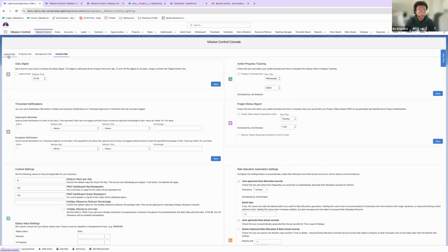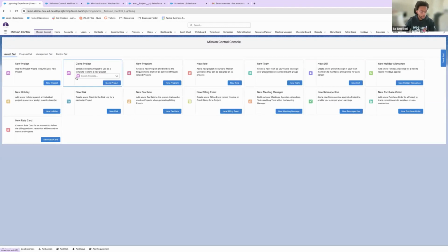All right. So let's go ahead and go into our workflow. I said I was going to come back here just briefly to showcase something that I feel is very, very important. Within Mission Control, you can have what's called project templates, right? So if you have common milestones and tasks associated with, maybe, an implementation package, where you know you're going to do these steps every time for this kind of project, this is when you'll create a template and essentially clone a project.